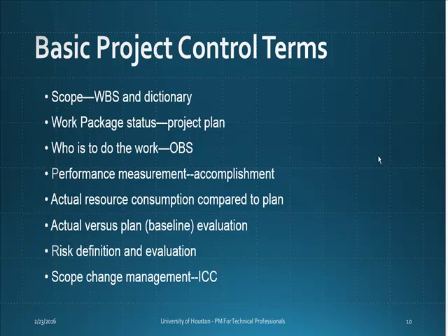To compare the actual resource consumption and our actual plan, this is what we call a baseline. We will need to establish the baseline based on planning, which means once we finish a plan and we feel okay, and then we get approval, we're going to freeze it, and that becomes our baseline.